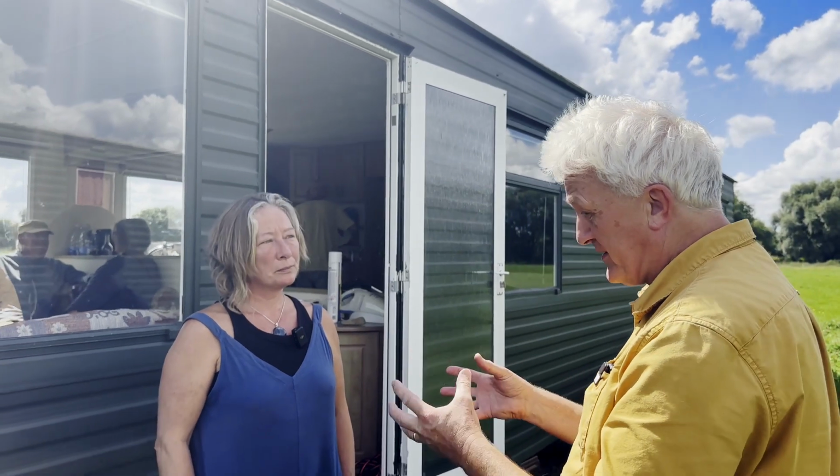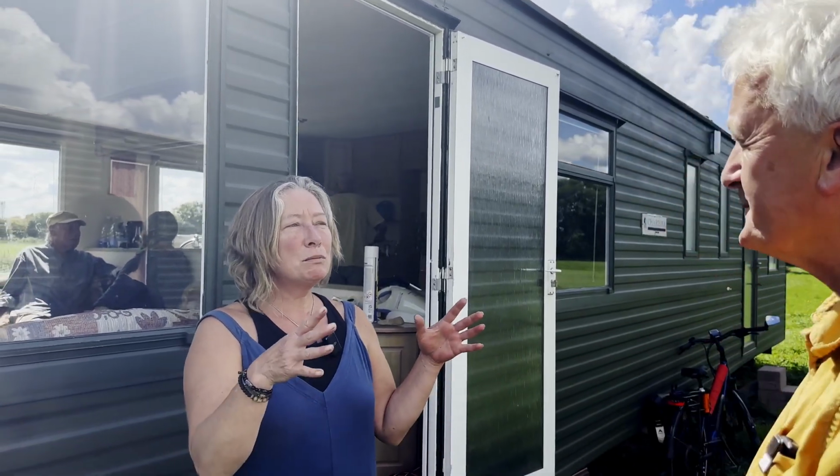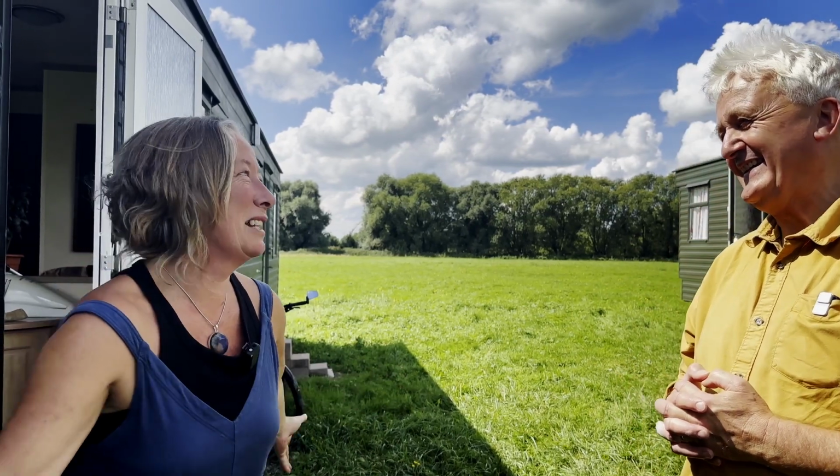Bon, just tell me a little bit about the plan. Once planning permission has been approved for this site, can you give the audience an idea of the immediate timeline? Yeah, so we've got till March '26 to complete the project, or to set it up, basically. First thing we're going to do is put in some groundwork so that we can get vehicles on and be on the land through all seasons. And then next spring we're going to start the barn build and the roundhouse build. Within those, there'll be courses and workshops available to all the community so that they can be part of the building. Hopefully by this time next year, we'll have a big barn uplift and then a barn dance.